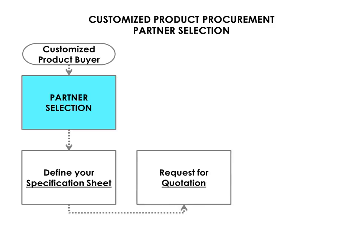The next step is to send out the Request for Quotation Pack. It is often the case, and also good practice, to send out details of a similar product in order to get rough quotations first. This allows you to compare quotes from different suppliers without disclosing the full information to too many companies. Once you have a number of quotations in, you can compare these and select the suppliers you wish to send the full technical detailed RFQ pack to.